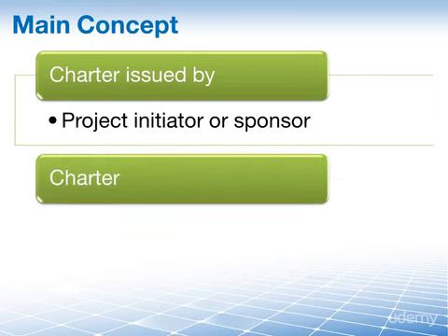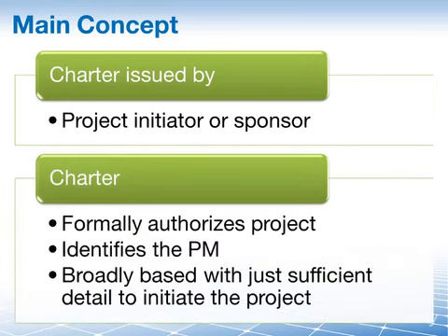The charter itself formally acknowledges the existence of a project and authorizes the project manager, who is named in the charter, to begin planning and executing the project. The project charter should be broadly based with just sufficient detail to initiate the project. And why is that? Well, identifying extra detail this early in the project wastes time prior to initiation.